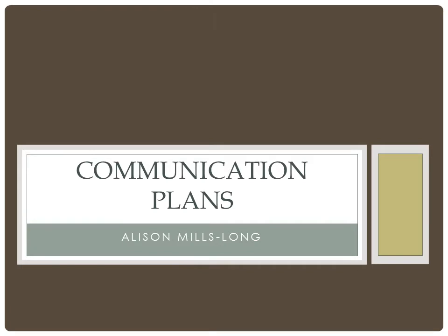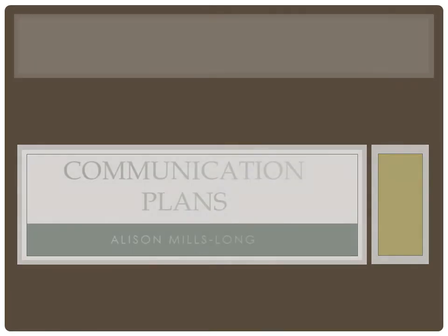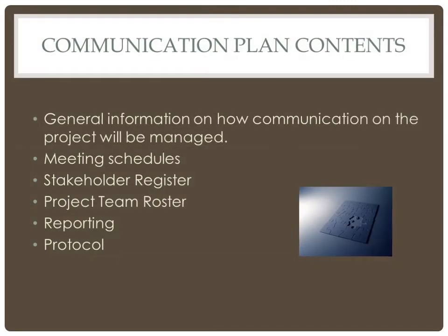Last month's topic was on project plans being more than just a task list. One component of a project plan is the communication plan. This plan covers how the communication for your project will be managed. It includes things like meeting schedules, a list of stakeholders, team members, reporting related to the project, and any specific protocol or guidelines for handling communication on your project.